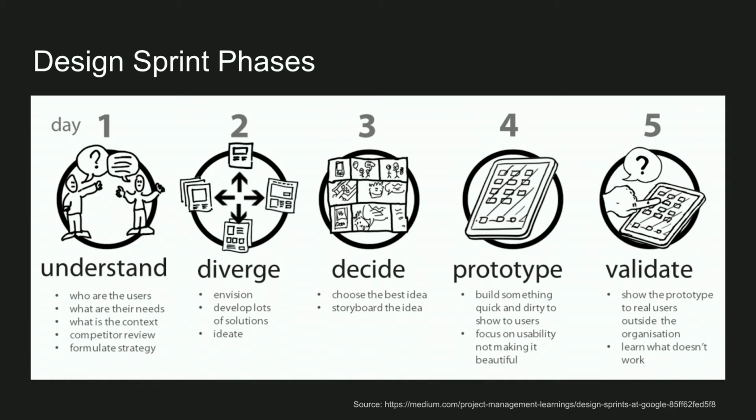The key, and I'll get to it, is that the facilitator is who actually ensures that things move along. The facilitator is somebody who knows the process very well, and doesn't participate in the actual activity. That person is just responsible for timing the activities, explaining what needs to happen and what the purpose is, mediating the conversations, and looking at the clock. There is actually a clock on the table for every activity.